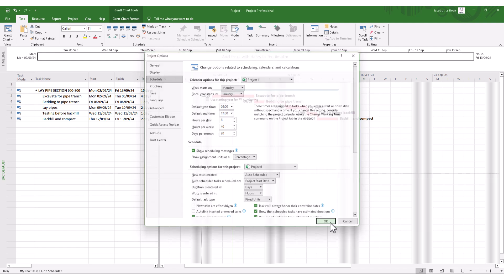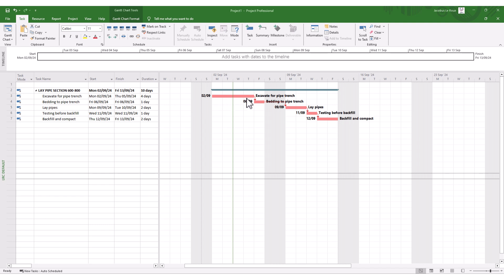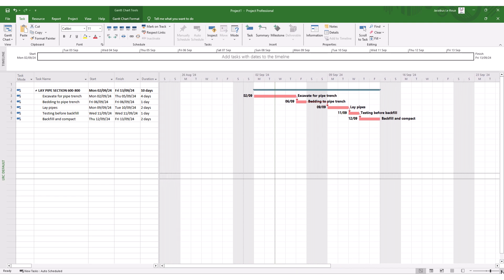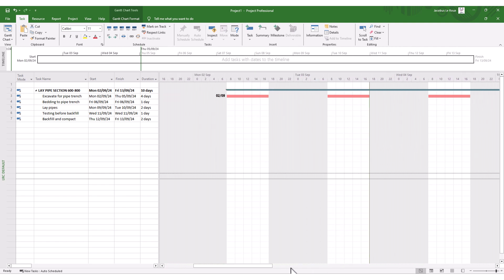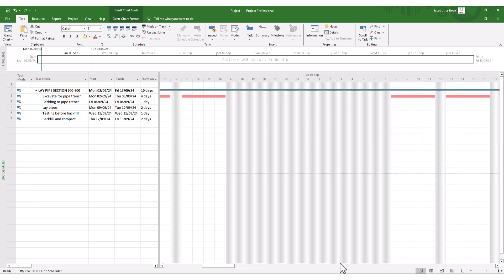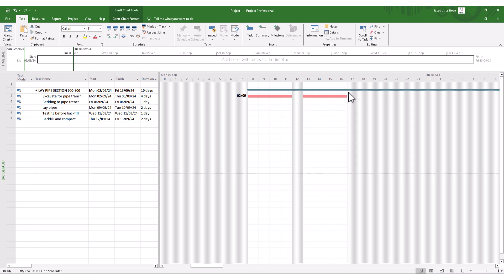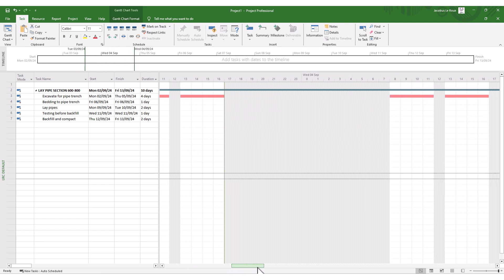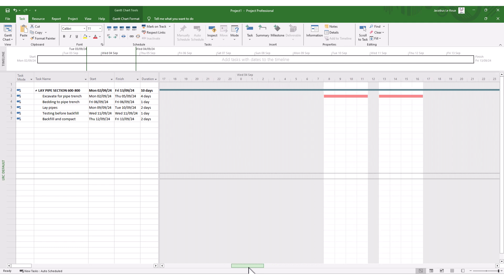Click OK. Looking at my simple schedule, I've got four days of excavation, bedding, laying of pipes, etc., all starting on a Monday. If I zoom in to the hours view, you can see how tasks are created. A task with four days starts at 8 o'clock and ends at 5 o'clock — that's exactly eight hours, with a lunch hour in between. This is the standard setting in MS Project, and if you keep using this without tweaking anything, you should be fine.